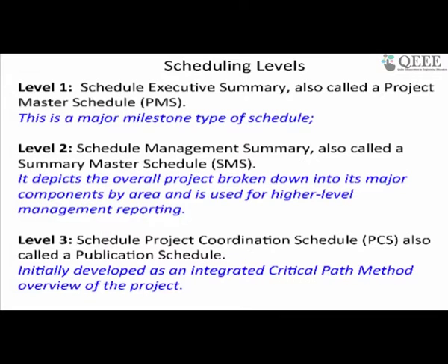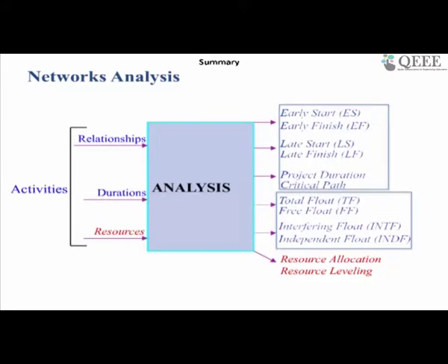So just understanding that we are actually targeting CPM level 3, and a planning engineer has to understand all levels and what each level is appropriate for. So CPM does not become the default technique for all levels of schedules. As per global practices, it's targeted level. So this is another part which you need to understand and pick up skills to be able to do it appropriately.